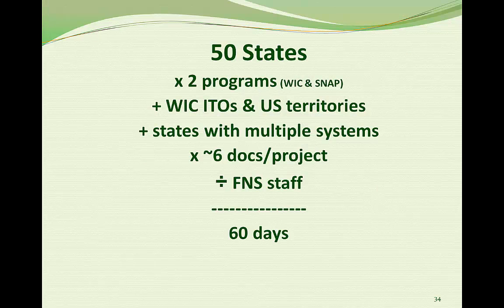Every state agency's project is important, and they are all on a schedule. It's safest to plan your project time frame with adequate federal review time built in. At least 60 days for each document. We're held accountable for that.